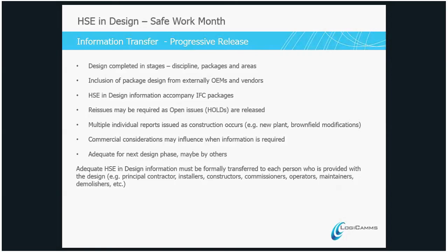HSE and design information accompanying IFC drawings. So typically we want to wrap it up and issue any information related to HSE and design with the IFC package. Need to consider any issues that arise from open issues. So do we need to reissue information because we've got holes? Say, for instance, we're waiting for a vendor to give us the hold down patterns for a large HV drive, and therefore we can't finish our platform design. That will become a hold, and therefore we may have to issue documentation twice once that hold's been released.